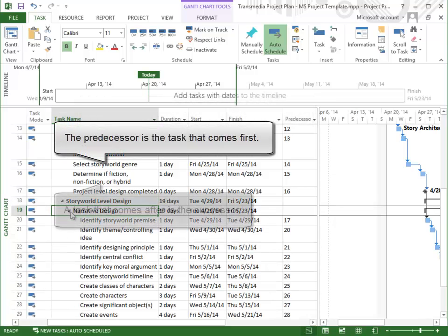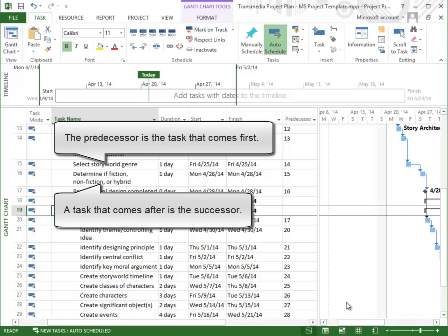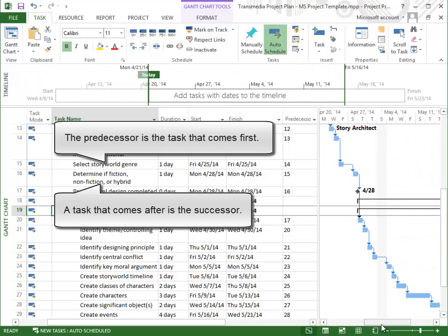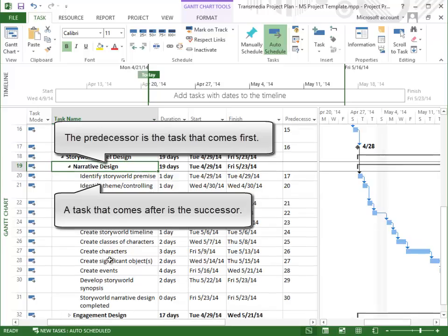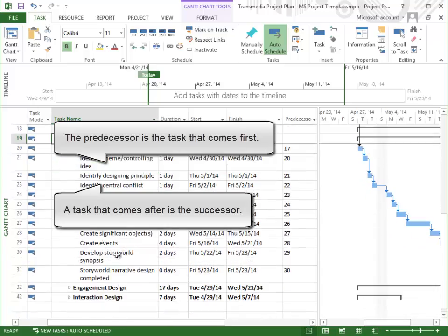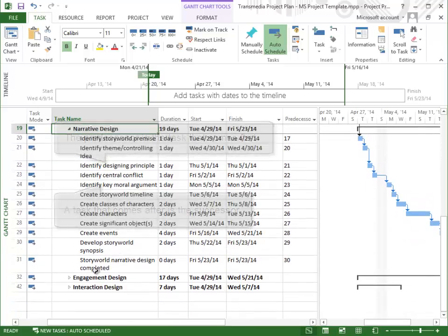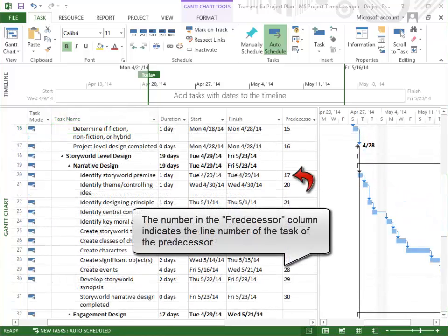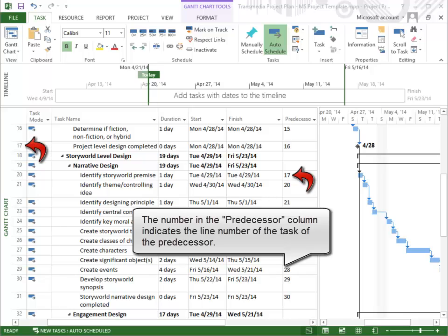The predecessor is the task that comes first. A task that comes afterwards is a successor. The number in the Predecessor column indicates the line number of the predecessor task.